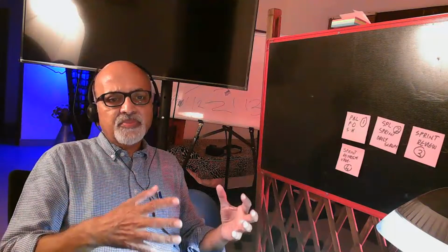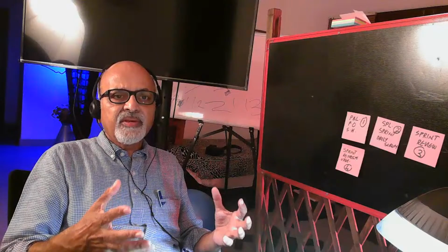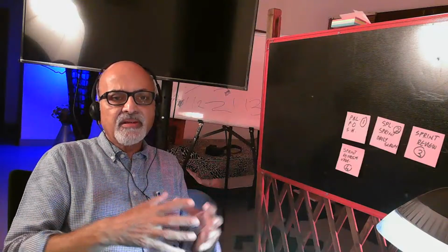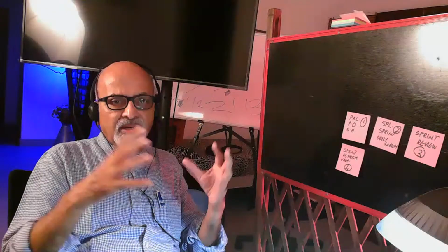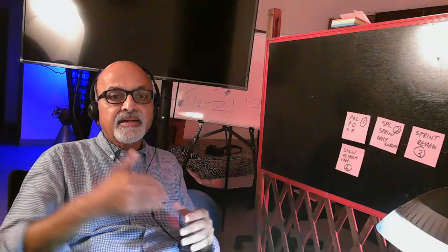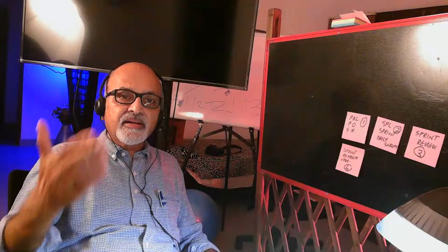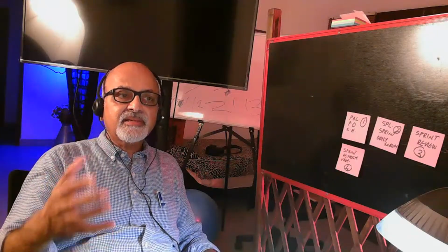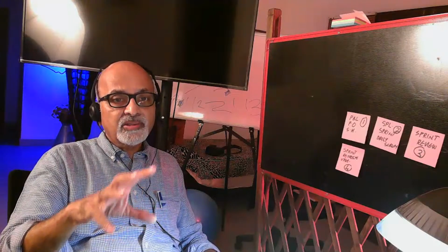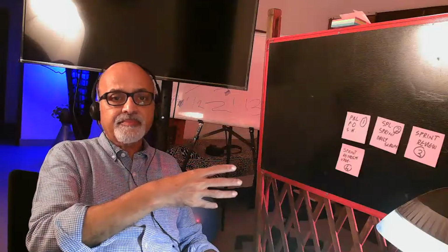In the earlier sprints our focus will be on the architecture, so we may not develop a lot of features. It is about putting the architecture and the standards in place, and testing the architecture for scalability, reliability, and stress. So we need more experienced architects to work in the earlier sprints.